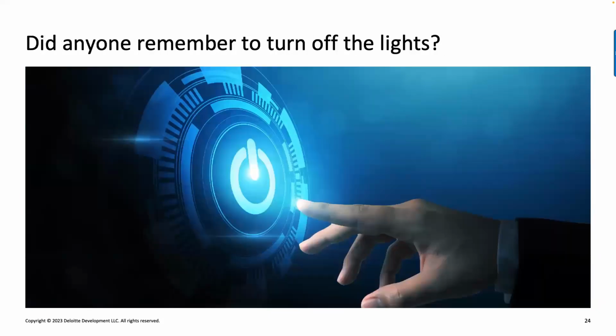And at the end of the day, I didn't touch on SRE and operations and all of these things. So security can be a factor. Operations guys, it's like, okay, what are you talking about, the cloud? We have no clue. What are you doing? And we need this much time to learn. Therefore, the journey is going to expand. In many instances, you factor that we are going to migrate out of cloud X to cloud Y in 3 months, 6 months. You discover that a year into it, you're still running the workloads in the existing cloud. You migrated workloads and you're on-prem, you're still paying for it triple ways, right?